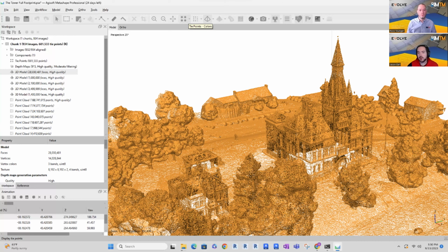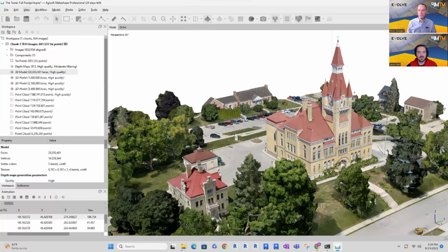But when we hand off those documents to the field, I don't know if something gets lost in translation a little bit, but there can be a breakdown in communication, and something that may happen in the field doesn't make it back to VDC, right? So the field gets something, they're like, we can't install it this way, and they just go ahead and install it. But with field monitoring, weekly or daily, somebody walks around with a little 360 camera on their hard hat and they just walk the job.